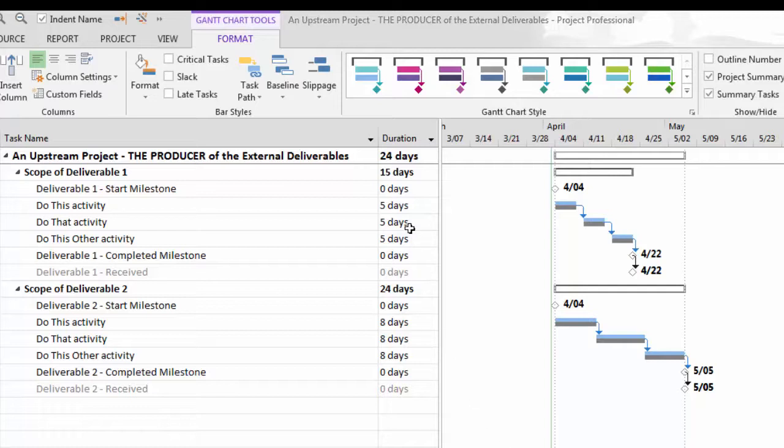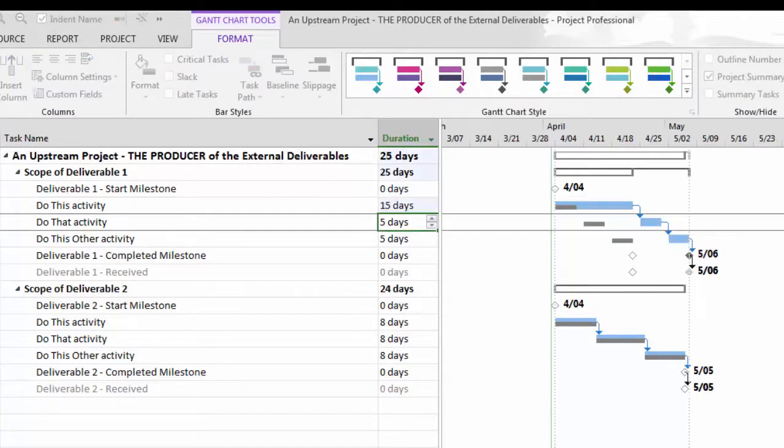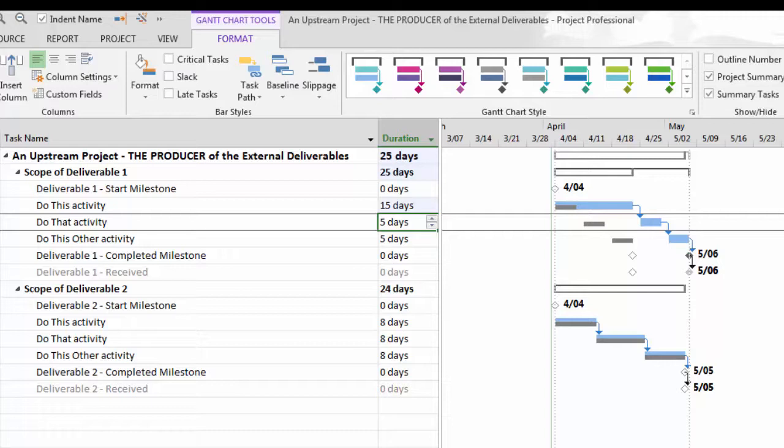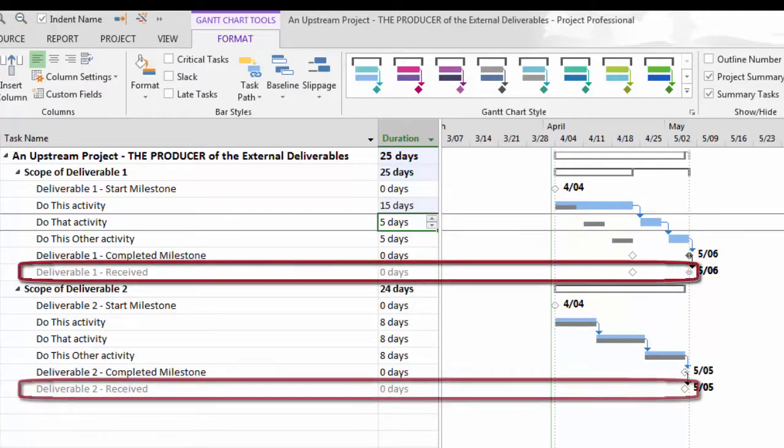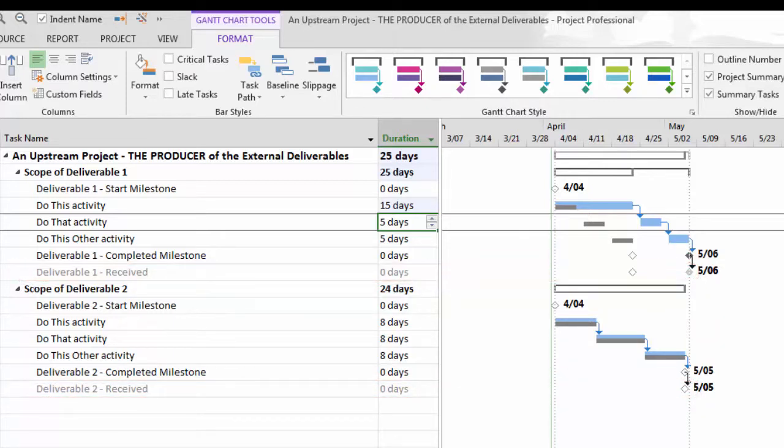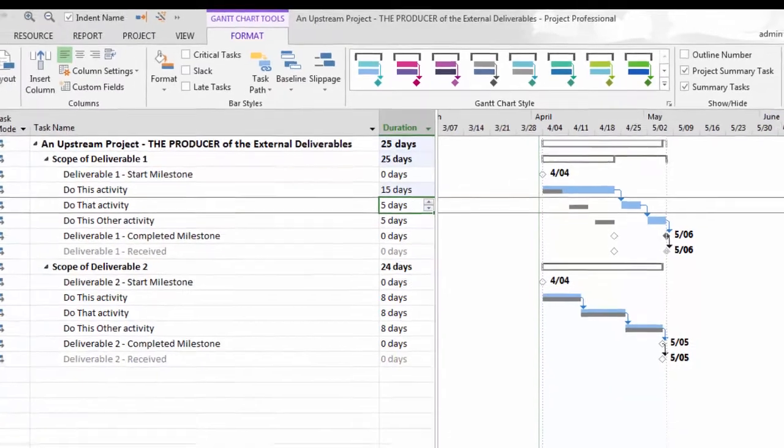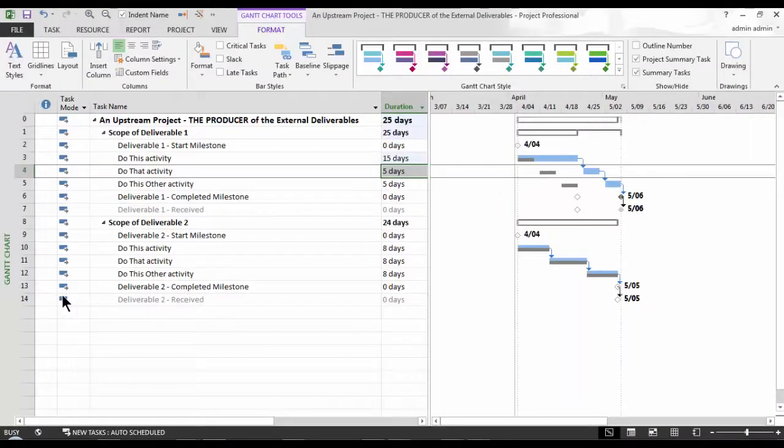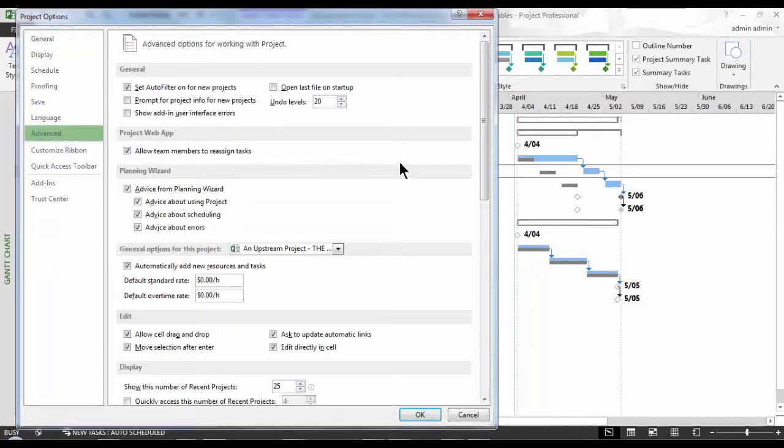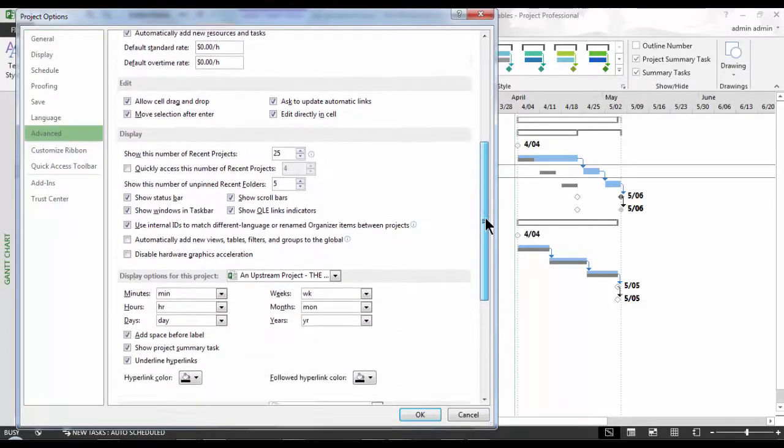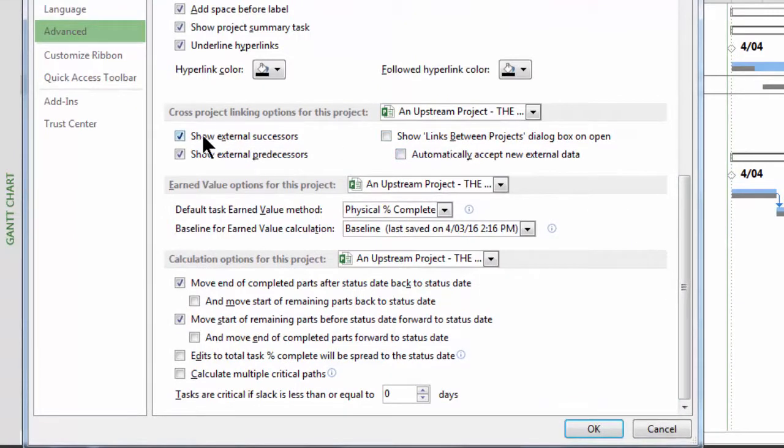Now, I will go ahead and simulate a change to our scope of deliverable 1 on line 3, from 5 days to 15. Notice how with one such change, the downstream activities are rescheduled accordingly. We can also see that the external dependencies are depicted in gray on line 7 and 14. The first one, the deliverable 1 received, due to the change, has been impacted. We can hide external dependencies if we wish to limit the level of detail in our sub-projects, and hiding them does not interfere with their external dependencies and their behavior. To hide them, go to File, Options, Advanced, and deselect Show External Successors and Predecessors in the Cross Projects Linking Options section.